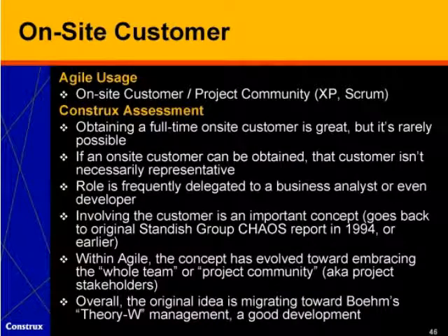The second to last practice that I'll mention specifically is on-site customer, and I think what we've seen is that the general idea of close customer communication is a good idea. The specific idea of on-site customer has been problematic, and so even within much of the Agile writing lately, the notion seems to have shifted from literal on-site customer to more of a project community. There are several reasons for this. One is getting a full-time on-site customer representative is problematic, very seldom accomplished in practice.